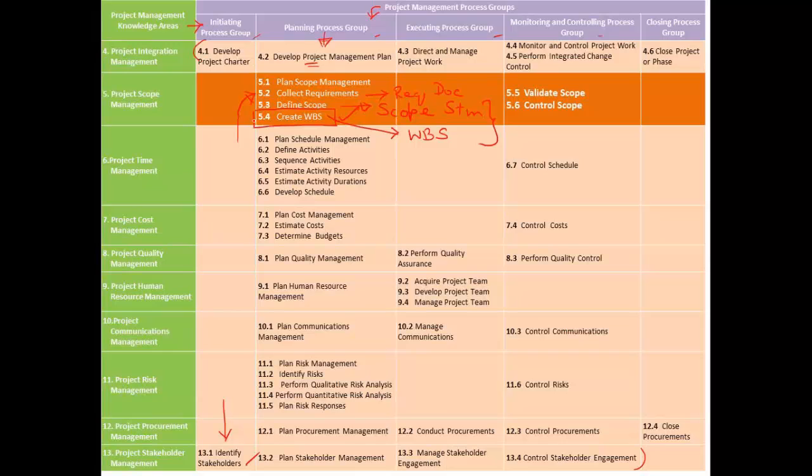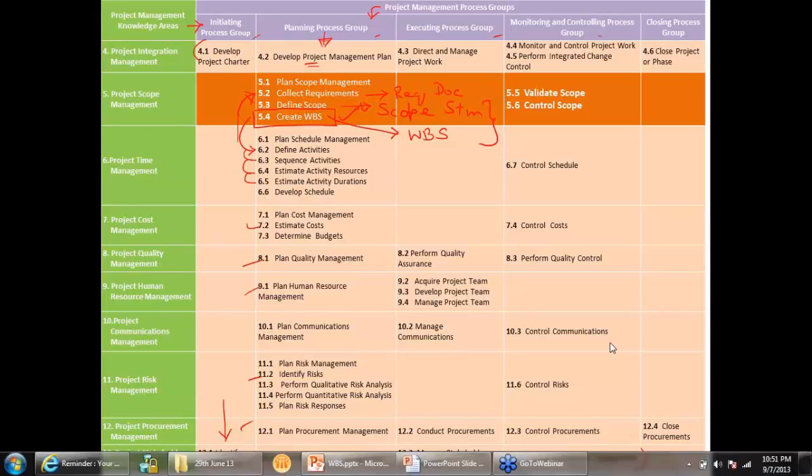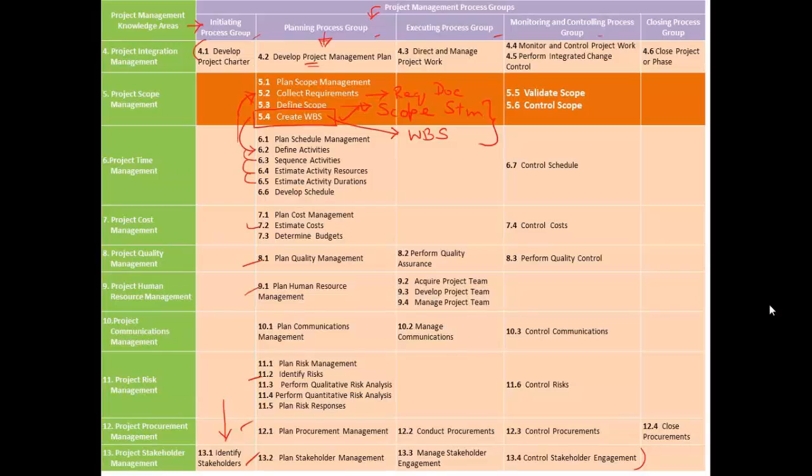This WBS that we created is used as an input for defining scope, sequencing, estimation from resource and duration point of view, also for cost estimation, and also for various other planning activities like planning quality parameters, planning the human resources, identifying the risk factors, and taking the procurement decisions, etc. So it's a very useful planning tool, okay? And that's why we consider it as a mandatory deliverable for any project, may it be a small project or a large project, complex or simple.